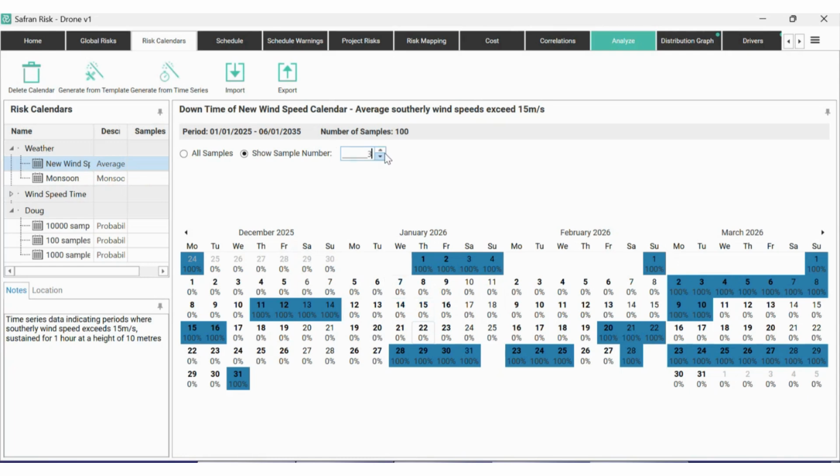And so if we had additional non-working periods in here, for example, let's say we had non-working periods for Saturday and Sunday in the activity calendar, then all we'd have in this particular iteration was 2 days of downtime, because these 2 days here are non-working periods anyway. Safran applies the probabilistic calendar, and it works with however the original activity calendar has been set up.